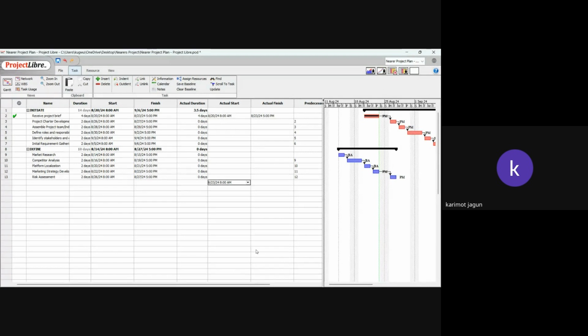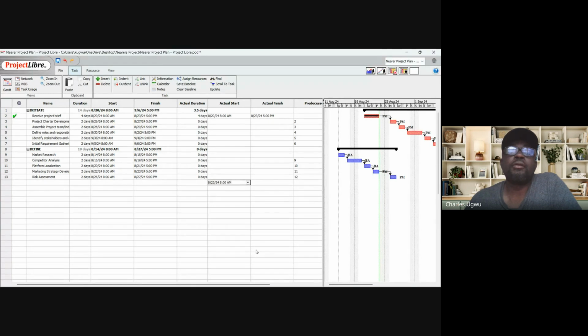Can we input a column for variance, or if you want to calculate the variance? No need for calculating the variance. Automatically, once you put the actual, the variance will be shown. It will show me by the red colors. You'll be seeing the areas that you have deviations. It will start appearing in red colors where you deviated.